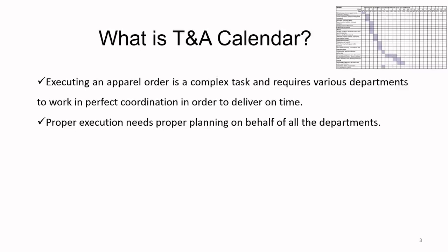If the fabric does not come on time, the production will get delayed. And if the production is delayed, then everything else will be delayed, and therefore the shipment will not leave on time.